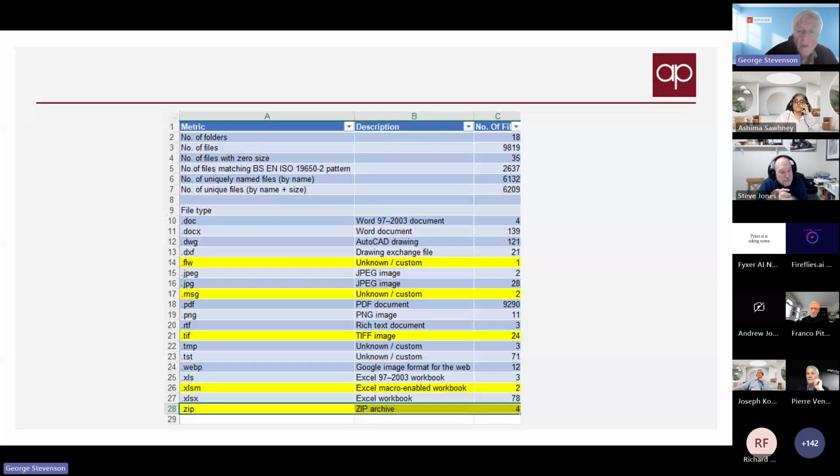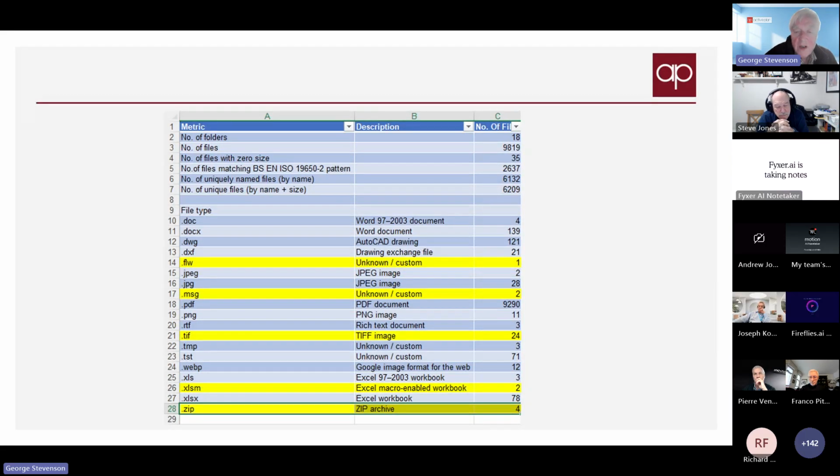So what we're doing here, we'll be showing how we can do this. We can take a zip file and it will analyze what's in the zip file and then very quickly tell you what the format is, so probably identify where there are incomplete files. That can be done in 10 or 15 minutes rather than spending several days doing it.